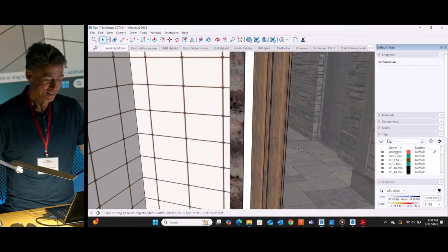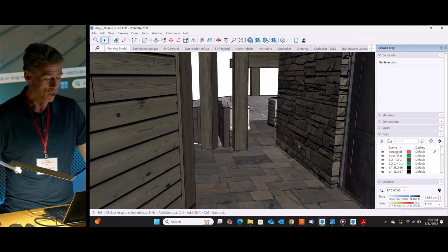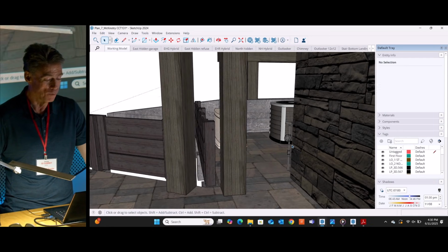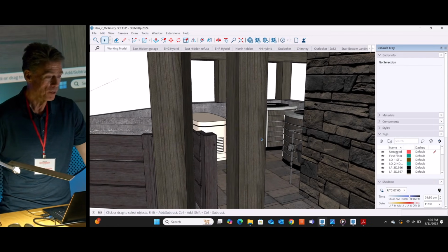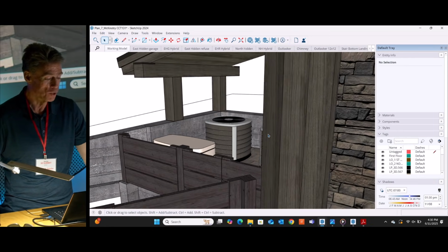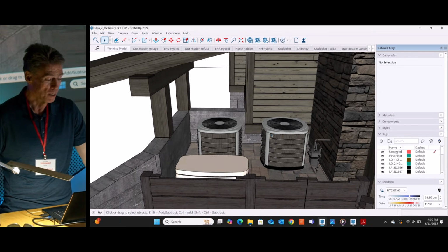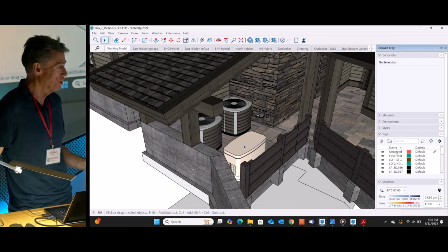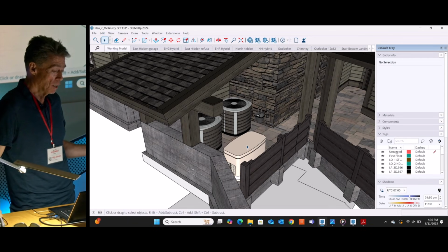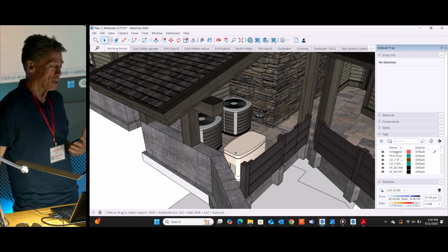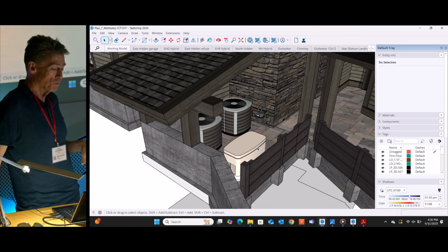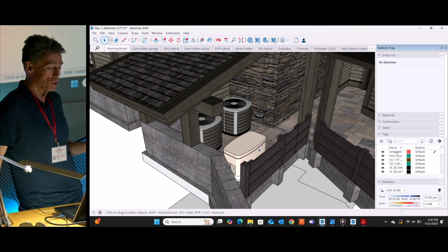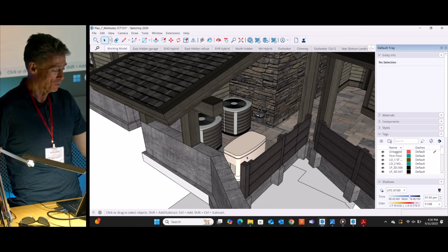And then out in the back, we have to be really cautious of all of our mechanical equipment. We have to put them under cover, otherwise the snow will completely destroy it. Same goes for generators. We can't have snow dumping onto them because they just get ruined. So everybody's like, oh, it's only $5,000 for the generator. I go, yeah, and $5,000 to install and $75,000 for the cover.